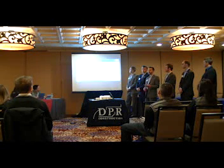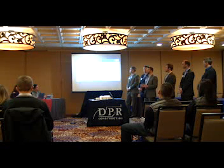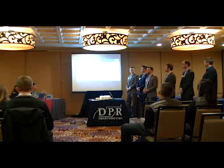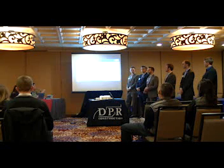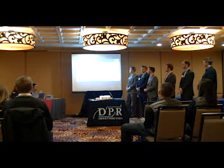In contract A, we were actually able to pick between two risk allocations. One, a safe harbor risk allocation that allows that risk sharing, and then one more traditional, more similar to contract B. Of course, if we went with this project and we were going to pick contract A, we would pick the safe harbor allocation of risk.